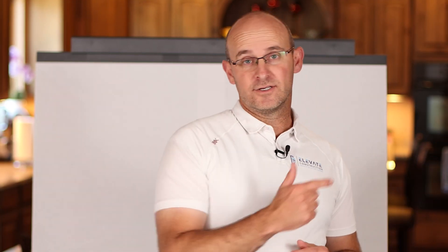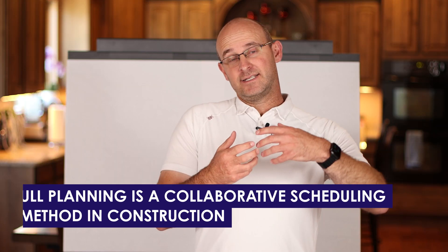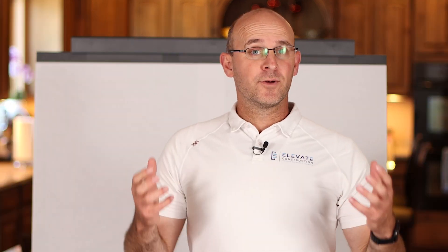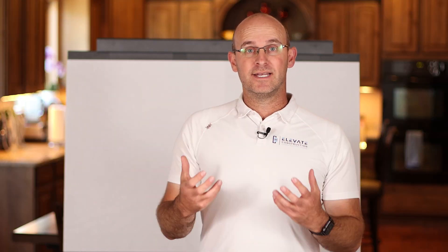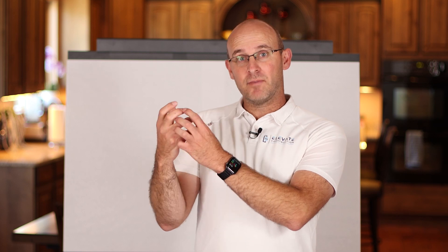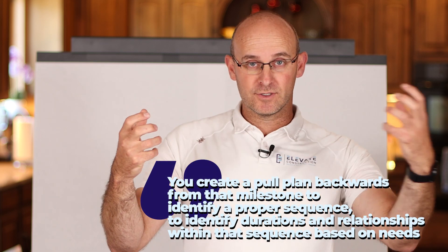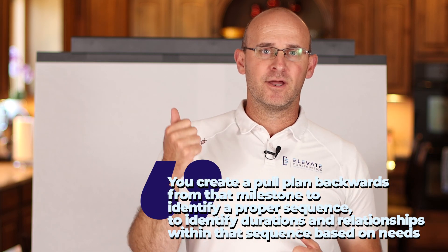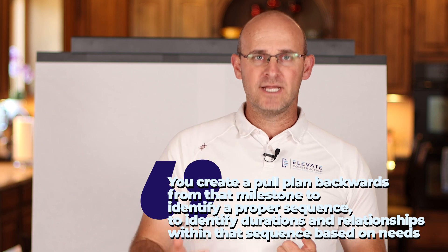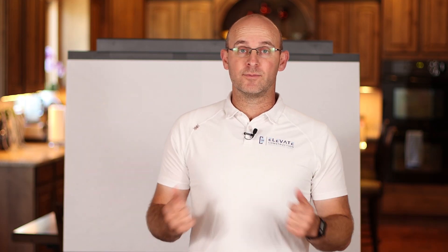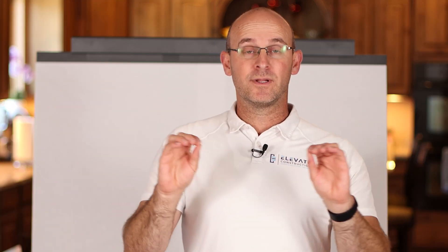Here's the definition of pull planning. Pull planning is a collaborative scheduling method in construction and it takes a reverse approach to sequencing. This approach takes multiple team players from the project, your last planners preferably, and gathers them together in a team and they identify a key milestone to pull from or pull to. You create a pull plan backwards from that milestone to identify a proper sequence, to identify durations and relationships within that sequence based on needs. When you're done, you should have all details and requirements on that pull plan as a part of that completed sequence.